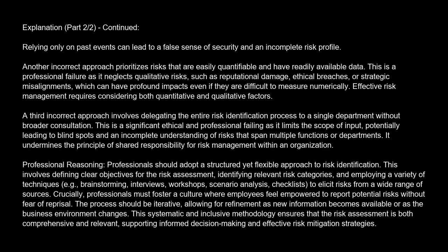Professional reasoning. Professionals should adopt a structured yet flexible approach to risk identification. This involves defining clear objectives for the risk assessment, identifying relevant risk categories, and employing a variety of techniques, e.g., brainstorming, interviews, workshops, scenario analysis, checklists, to elicit risks from a wide range of sources. Crucially, professionals must foster a culture where employees feel empowered to report potential risks without fear of reprisal.